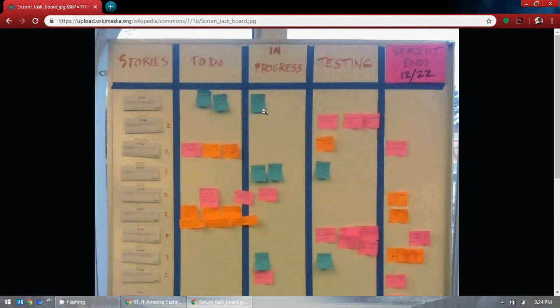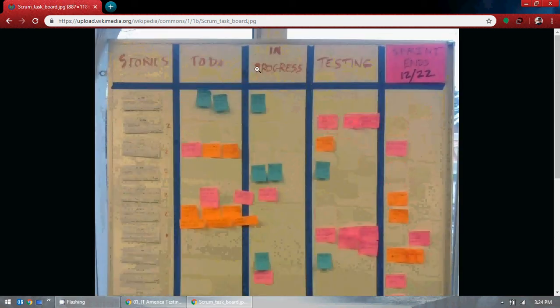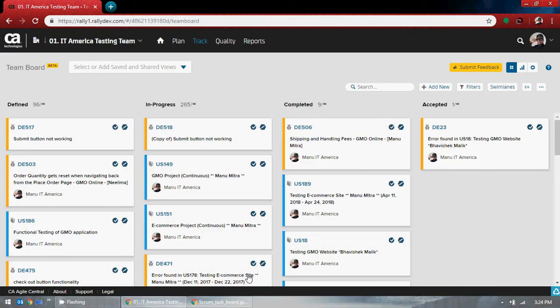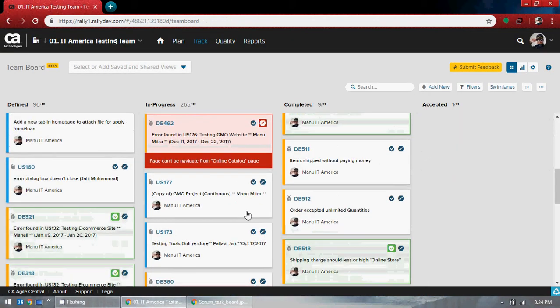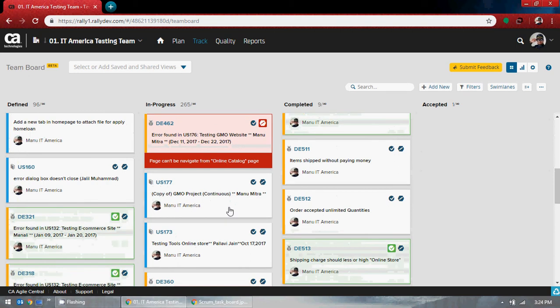Always the developer starts the work, and testers — whenever testing starts — development has to be completed before testing starts. You cannot do testing before development; it's not possible. Instead of doing this the traditional way, there is an online way of doing this. The point is, instead of putting sticky notes on a board and moving them to in-progress physically, you do it here online. How cool is that.